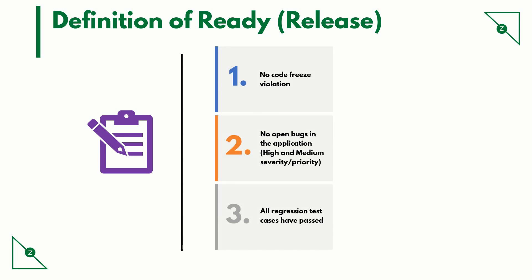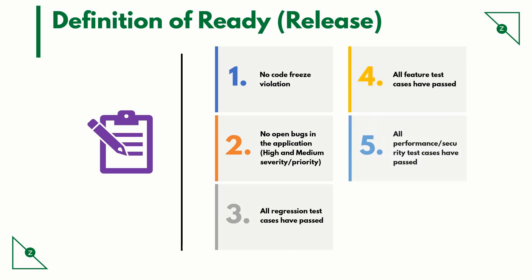All regression test cases have passed. All feature test cases have passed. All performance and security test cases have passed. And code quality and test coverage are as per agreed standards.